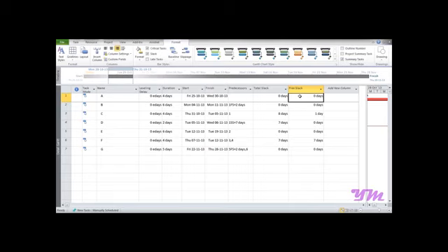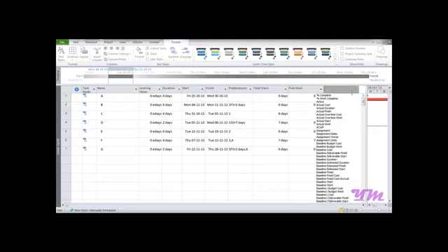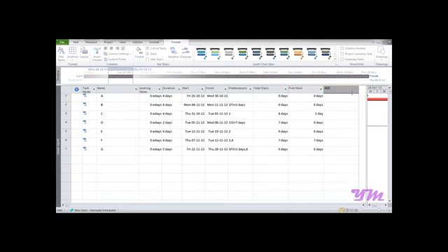Now after directly adding total slack and free slack, you might know the formula for interfering slack, which is total slack minus free slack. Now if we go to Add Columns and write interfering slack, it doesn't appear. So now the question is how to bring that into Microsoft Project 2010, as it doesn't have it as an inbuilt function. You need not worry at all.